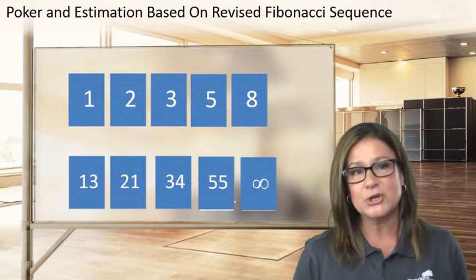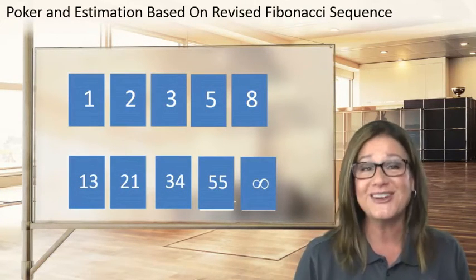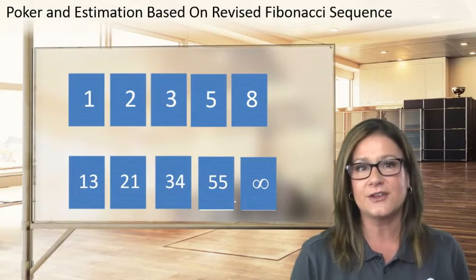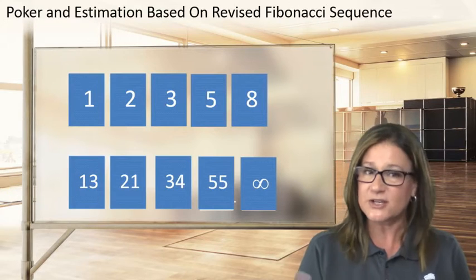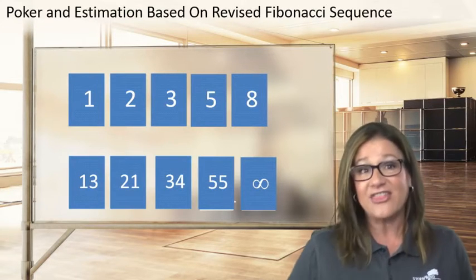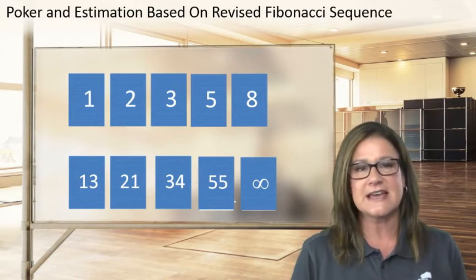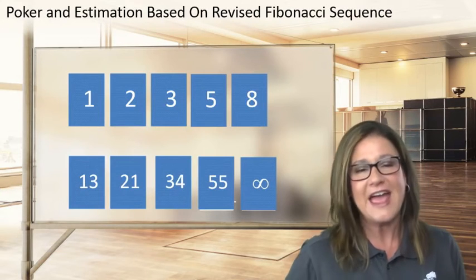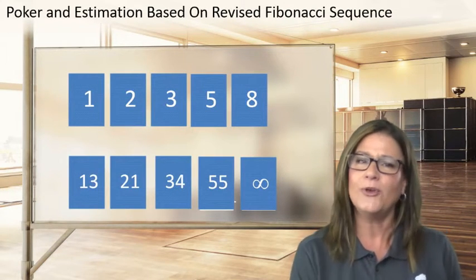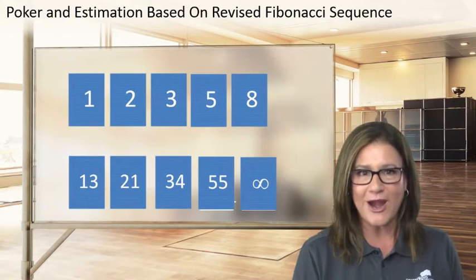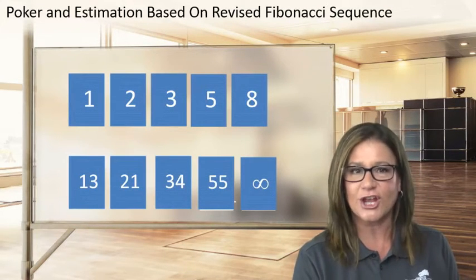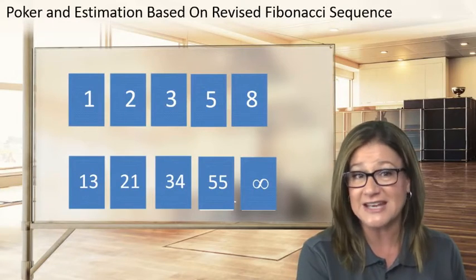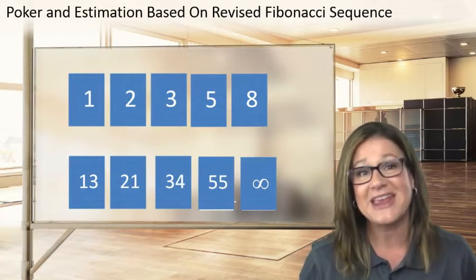Well, what we have to do as a self-directing team is sit around a table and triangulate some of the work and get an idea about what that looks like. Is it a 1? Is it an 8? And then once we have that, we can all sit down as a team and play a little poker. And that way we're reaching consensus, almost like a Delphi method, but we're engaging in conversation to prove why we think something's an 8 when somebody else thinks maybe it's a 2.